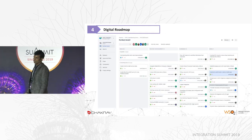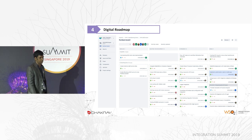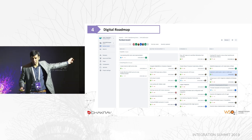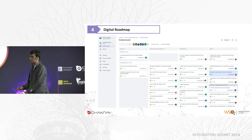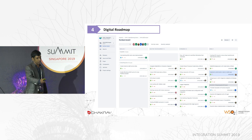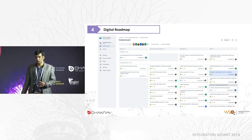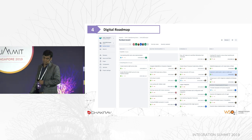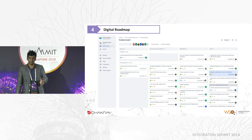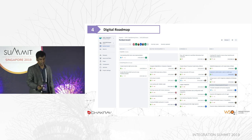The fourth point is the digital roadmap. Now that you have the analysis, architecture, and deployment model, you can create the digital roadmap — a list of all features needed to successfully deliver the digital transformation of ToroBank. We use tools like Confluence and Jira, or industry standards like VersionOne. We use a Kanban board and create the full digital roadmap. These first four items — discovery, architecture, deployment, and roadmap — we call the Chakra Accelerator Program, or CAP. For small to medium-sized organisations, it typically takes about one week.